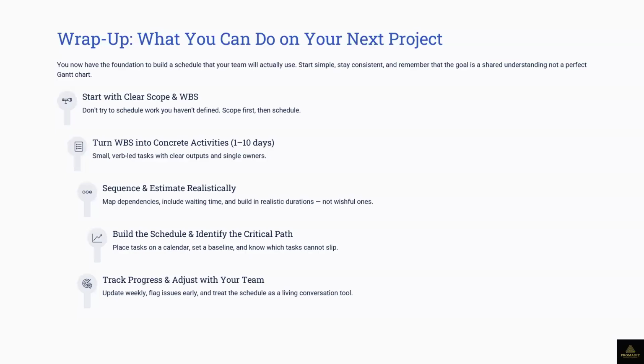If you know what iteration means, you adjust things, increase, decrease, add, move things forward, move things backward. As you are doing that, the schedule will be showing you what the end date is. You'll be seeing it because things are already linked. As you are moving things around, things will be changing. So that's what the scheduler basically does. At the end of the day, it comes out with different scenarios and advises you, and you will now make your decision as project manager. So they don't see it differently, they see it the same because you are working in unison.